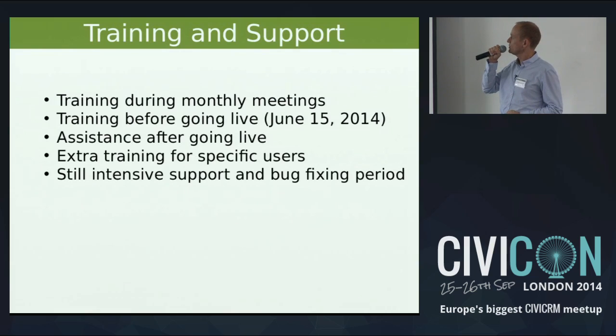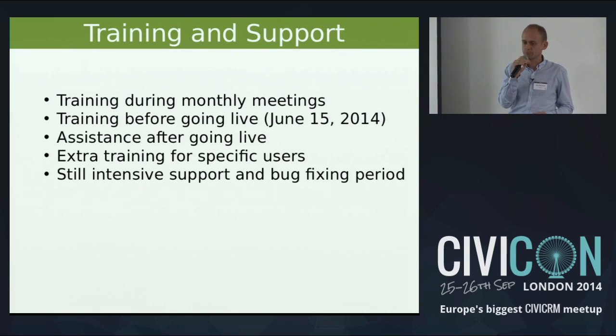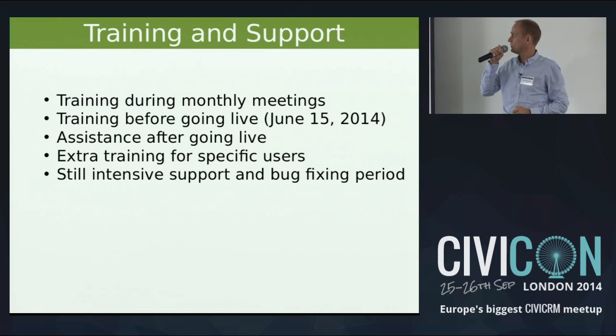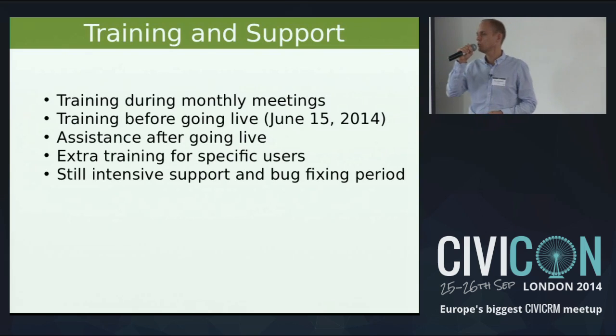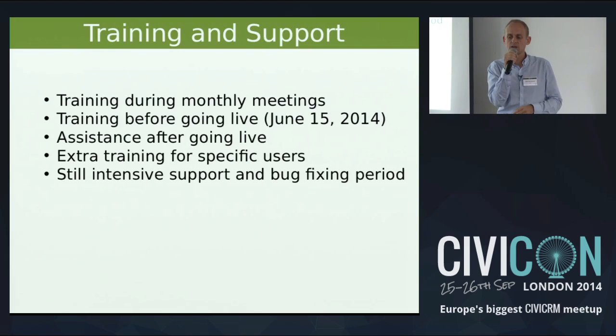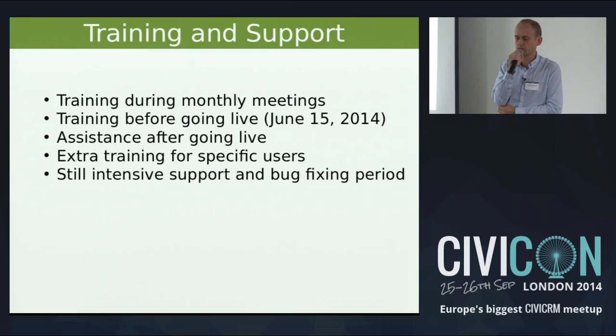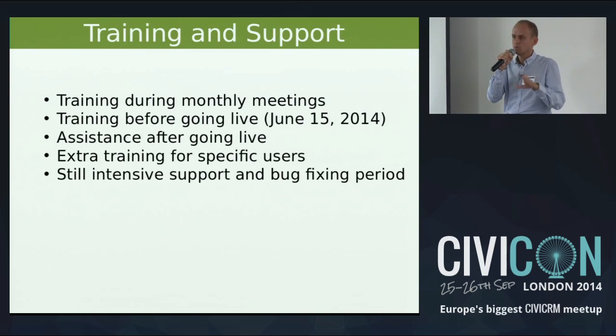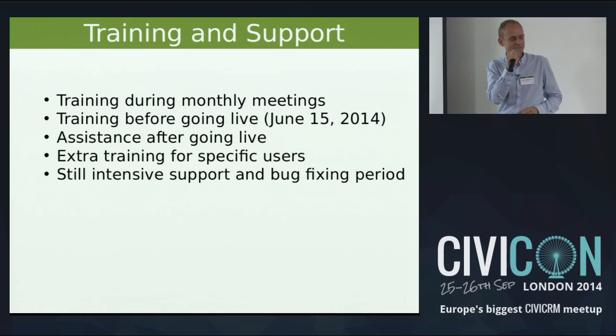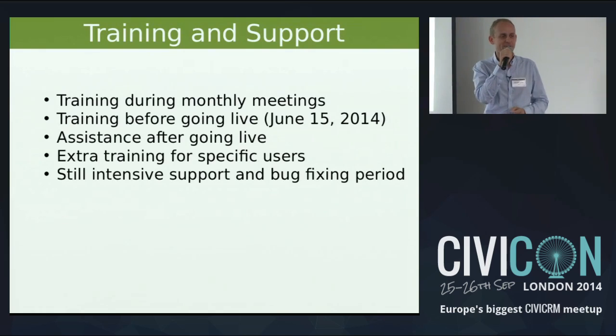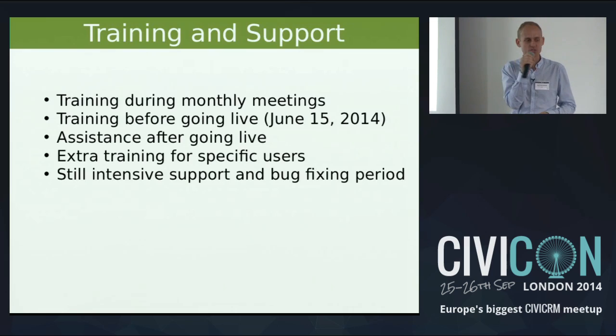Then, before going live in June of this year, we did a recap of all the things we implemented, because we also had some custom extensions that we developed to do particular things. So they got an overall view of how to use it, and then we went live. But we gave assistance after going live. We said to the people, okay, for the next two or three weeks after the migration, we will be available 24 hours a day, 7 days a week, so that they could reach us for questions and assistance.